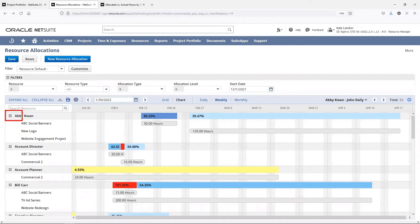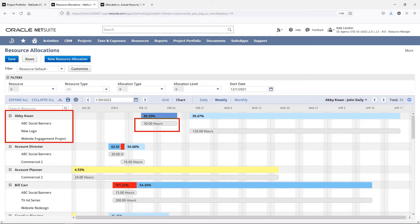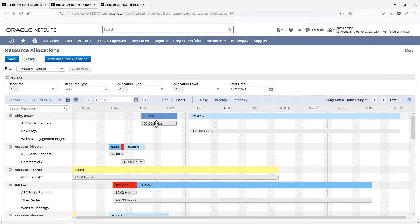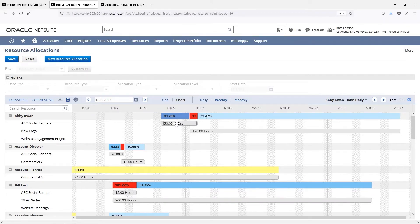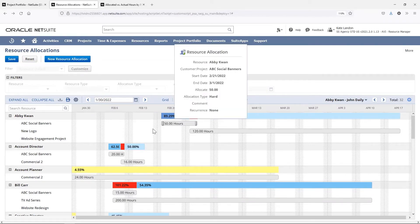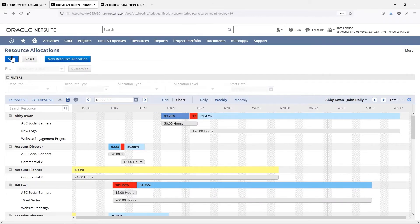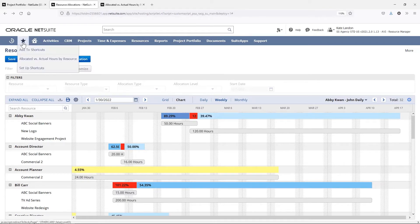When I replace the generic resource with Abby Kwon, this color-coded bar will help me understand whether we are over or under utilizing her for that period of time. If needed, I can change the start date by moving the bar on the chart and clicking save.